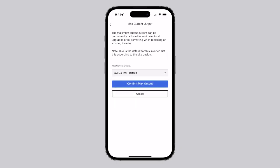Please note, the maximum current output can only be configured once. If this value needs to be changed after initial setting, installers will need to contact Tesla Support.